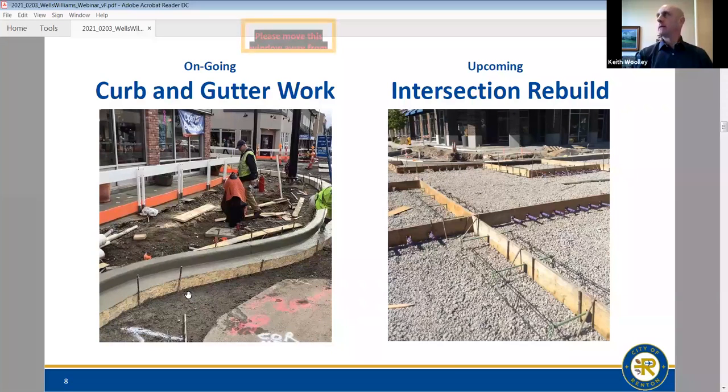Yeah. To be honest, concrete is not as weather dependent as asphalt. You don't want to do it in freezing temperatures, but I think everybody can agree we're probably done with freezing temperatures this year. We're into February. Of course, now that I say that, it'll probably snow next week. But after February 15th, unless it is a serious downpour and you're having trouble controlling the water, you can cover and tarp concrete, as long as not too much water is going into it as you're pouring it. So there's not too big a concern about weather with the concrete work. Like I mentioned, the final asphalt overlay of these four streets and the final striping can be a little more weather dependent. If you stripe when it's too cold, your striping's gone in 4 months. You just wasted all that money.